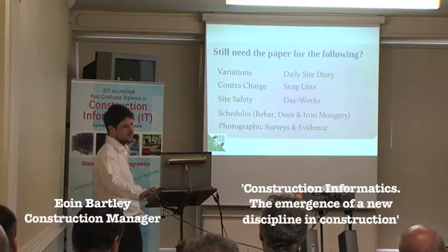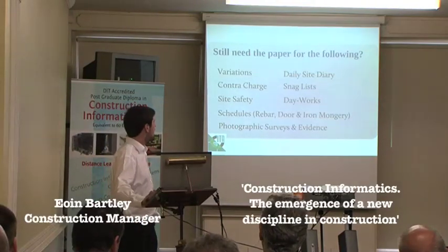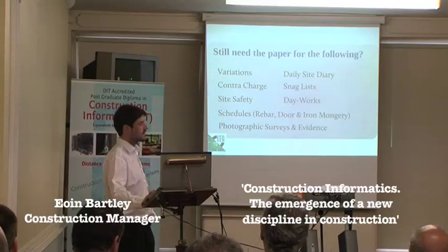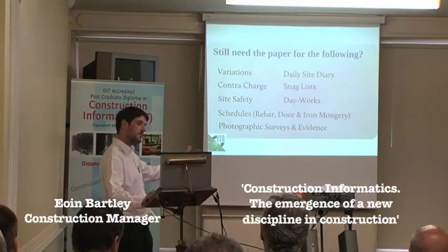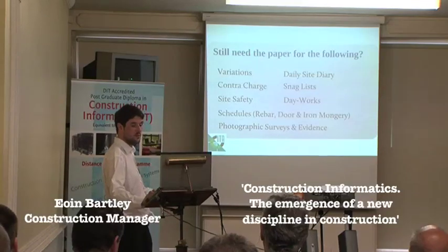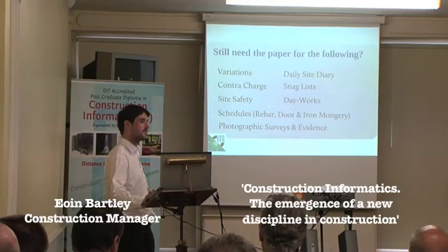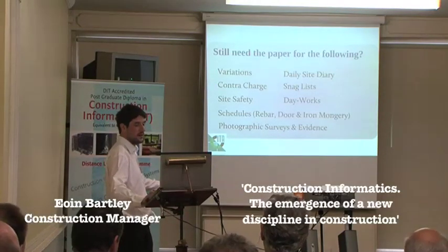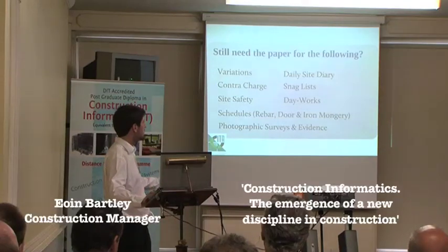Snag lists, which was a huge paper one for me as well. Totally putting that onto a collaborative document where we can share that document out to subcontractors, and they know what they need to do. And when they have done what they have done, they just change that on the document, and it comes back to you directly straight away. Straight into the hand, and daywork as well.